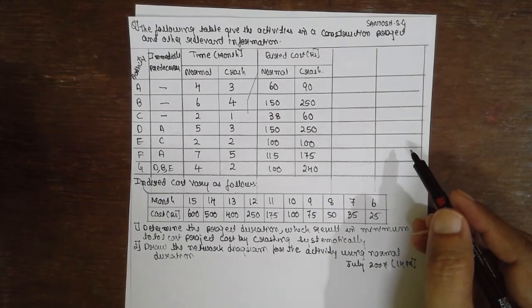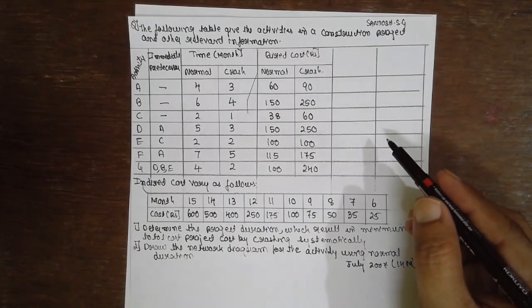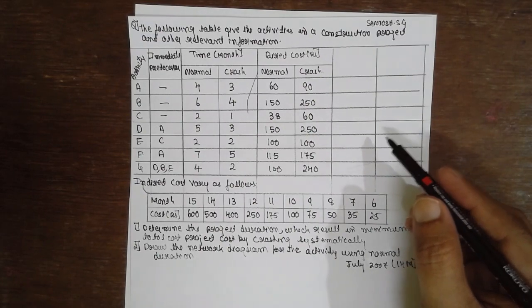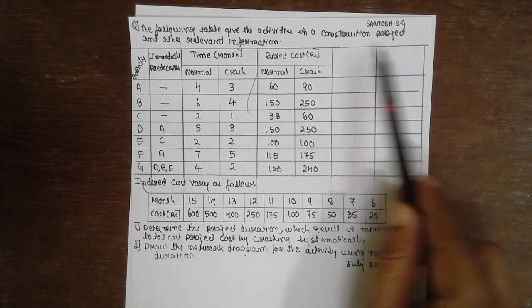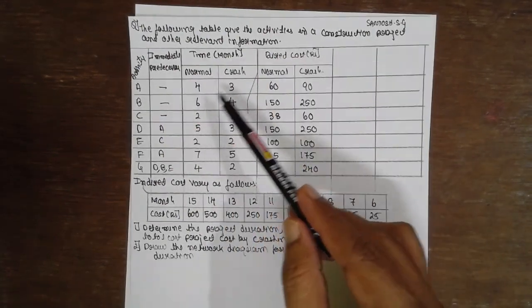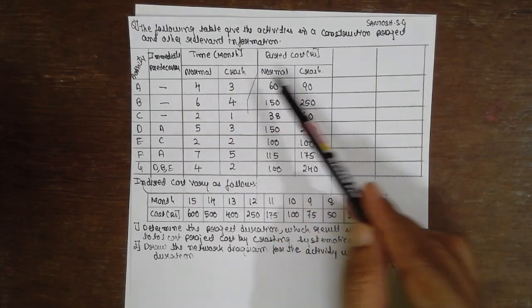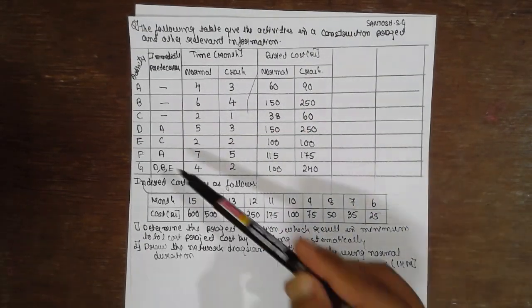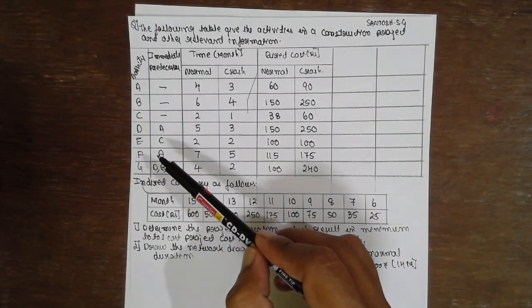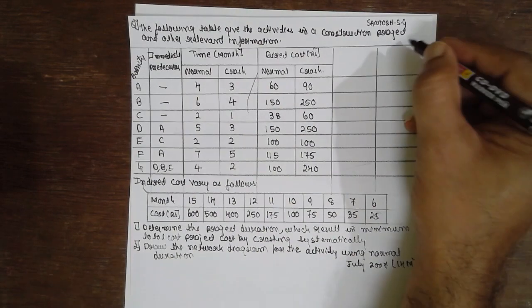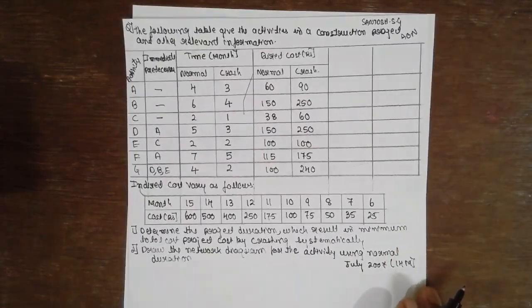I am Santosh Ganyankar. Today I am teaching you Operations Research, specifically the crushing of networks. This is the problem: the following table gives the activity, and we need to construct the project. Other relevant information is also given. The activity, predecessor, time, and direct cost are given. Since activities are in terms of ABCD, I am referring to the AON method — Activity On Node method.